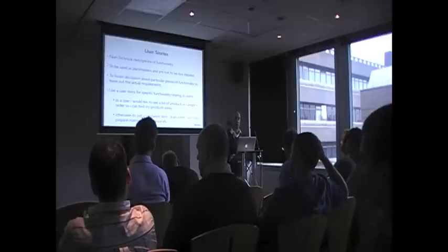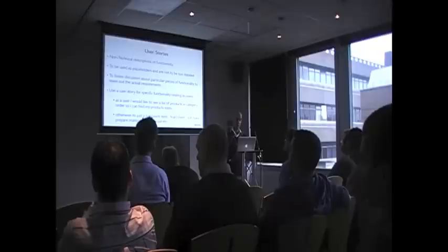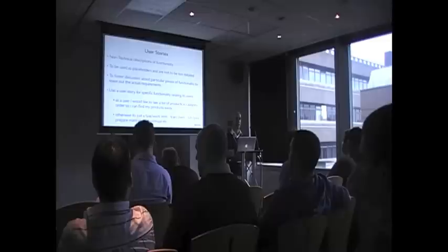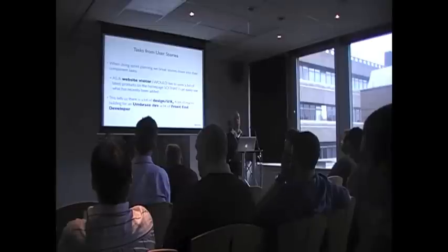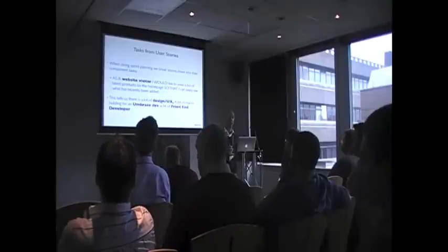And what we kind of do, so the user stories, they're to foster discussions really, to get information out of the client. There's kind of 2 types of user stories. There's the user story, which is a piece of functionality, or it could be a task. So you wouldn't necessarily do a user story for the client needs to be trained or need to write a manual specifically. So the way we work with user stories, when we're doing sprint planning, we do sprint planning on a Friday for the next week.